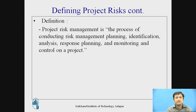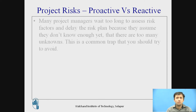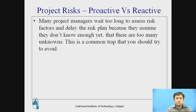There are two types of project risk: proactive risk and reactive risk. Many project managers wait too long to assess risk factors and delay the risk plan because they assume they don't know enough yet and there are too many unknowns. This is a common trap you should try to avoid. We have to search from previous projects, understand what risks were involved in similar projects, and have a brainstorming session among our employees.